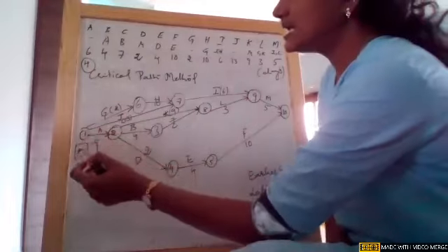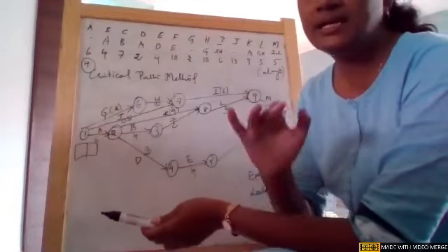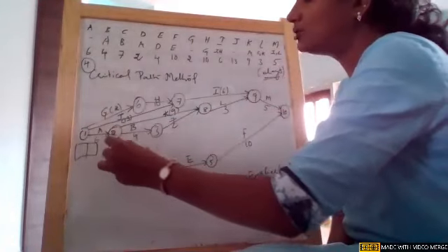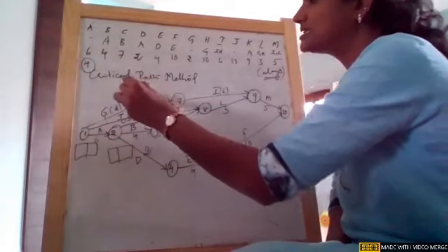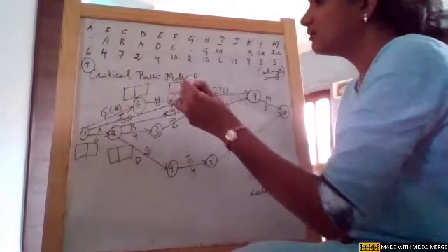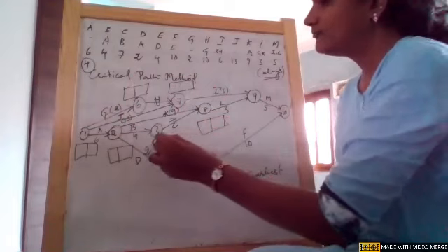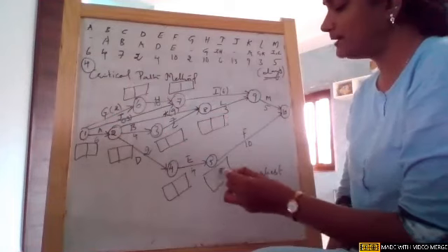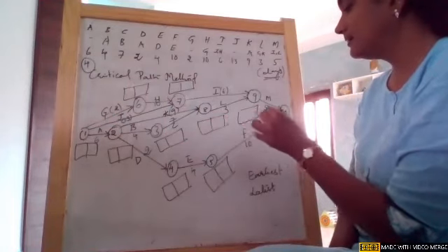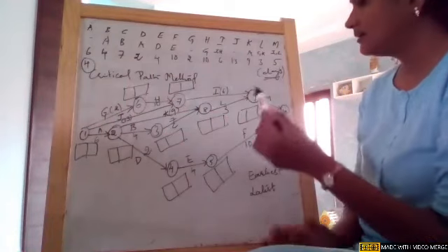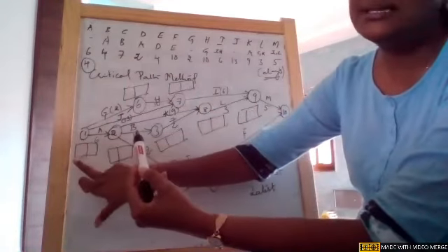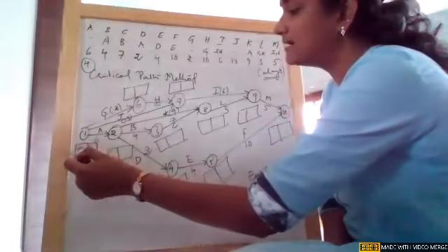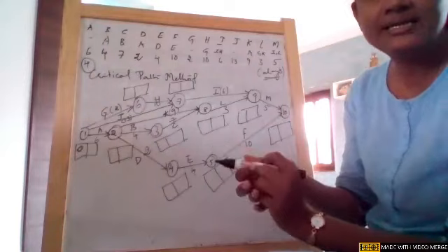So earliest is nothing but the duration, obviously in days. Now if you see, our duration is in days, don't forget that. Okay, for every node I need to draw this rectangle. This is for 2, for 6, for 7, for 8, for node 3, node 4, node 5, node 9, and node 10. Okay, so now obviously it is the first node because it is the initial node. I call it the start, and the earliest time I call it 0.